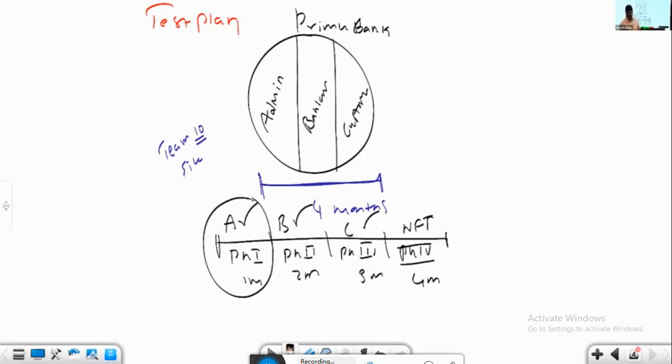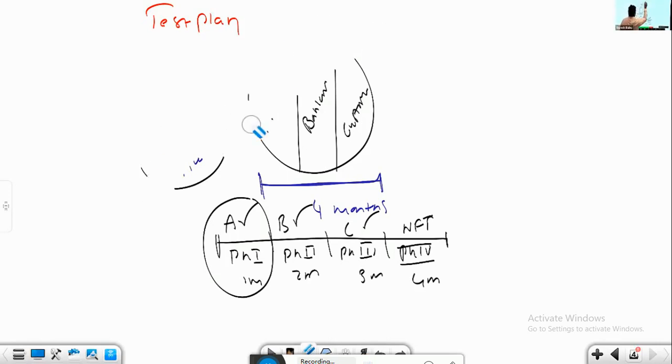The management decided like this. This needs to be communicated to the 10 people. Then they study the requirements of only module 1, the admin module. They write scenarios and test cases belonging to only the admin module in the first 1 month of the schedule. This will be updated in the test plan document, under a section called scope of testing.